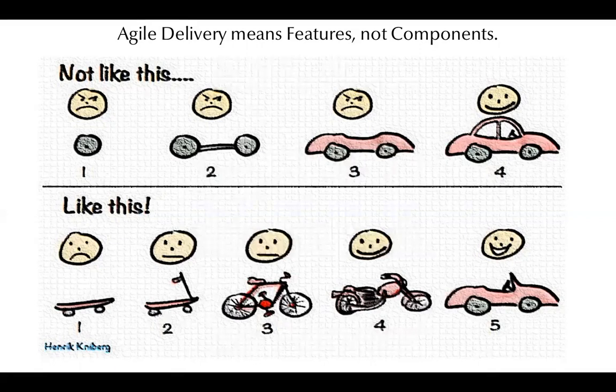We can test the riskiest assumptions that we've got, which are around lubricants and bearings. And then by adding an extra feature or two, by adding a steering column, we can start to test the assumptions inherent in the steering geometry. When we add a drivetrain and a seat, we make a bicycle of the thing, then we can start to test things to do with gearing and steering in a way that has very little to do with body weight, and more to do with a control mechanism.